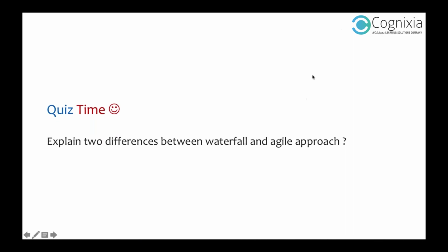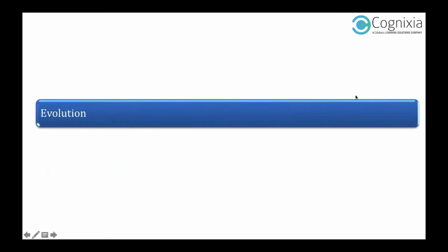Okay. All right. So basically there is a small difference between waterfall and agile. Waterfall is mainly like you start with day one and you end with day 10, where you don't involve any customer feedback. But in case of agile model, you take customer feedback on a sprint basis, which could be every month. So there are three slides which are going to give you absolute clarity on the difference between these three technologies.